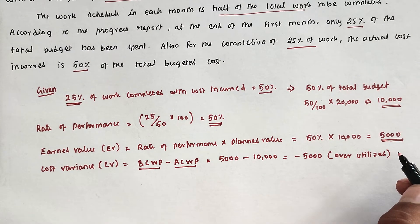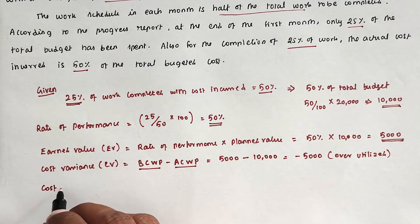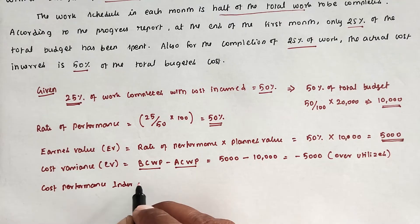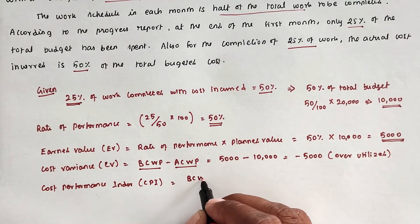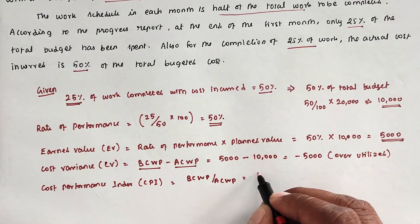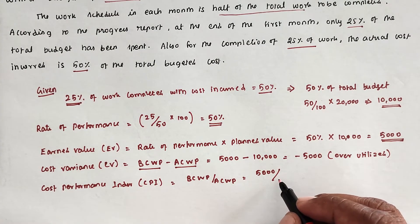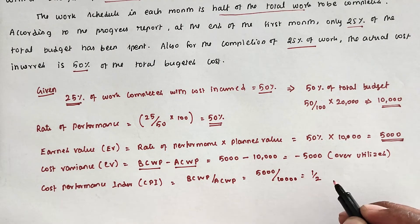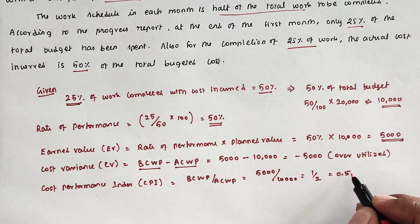Next we find the Cost Performance Index (CPI). CPI = BCWP divided by ACWP = 5,000 divided by 10,000 = 1/2. So CPI equals 0.5.